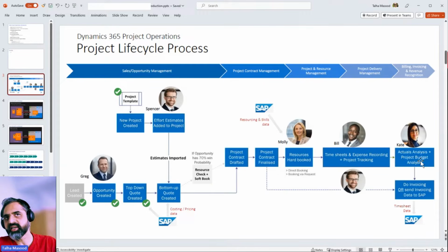Let's say for the first month, I consumed 80K only, like 80K dollars worth of hours. The next month, much more activity happened, so I spent 120K worth of hours, and in the last month, I spent the whole of the remaining. So time and labor type projects allow you to invoice the customers for the previous month or period. The person who's creating the invoices for this particular customer will extract all the data from within the system, that this is what the timesheets are, and automatically the system will allow them to convert that into an invoice with the rates.